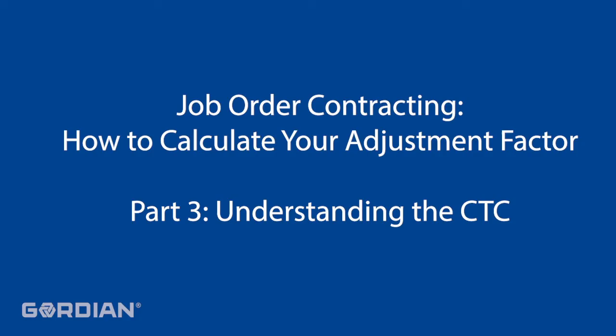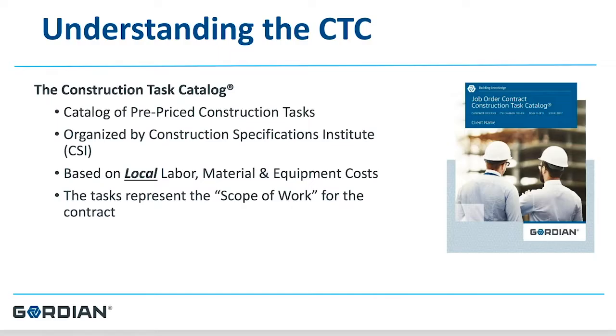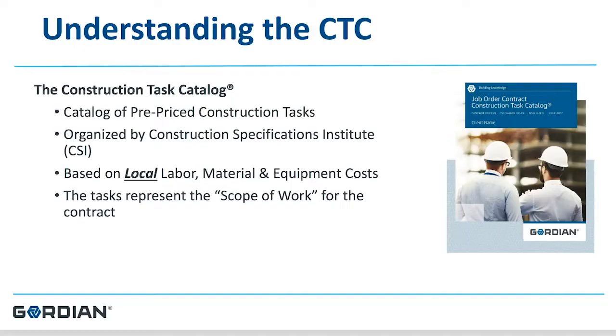Understanding the construction task catalog may be one of the biggest hurdles that the bidding contractor has to grapple with initially. The CTC is a large volume of pre-priced construction tasks — upwards of 180,000 construction-related tasks — with all divisions of construction represented. All tasks have a very robust, detailed description, and all will have a unit price for the installation of the item referred to. All unit prices are based on local labor, material, and equipment costs. Gordian does the pricing research to help establish the unit costs in each book.